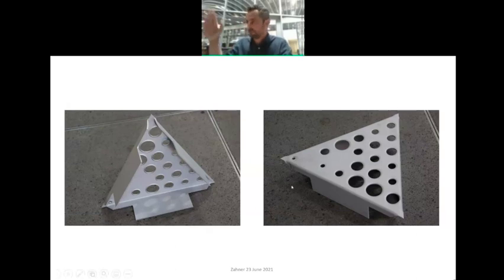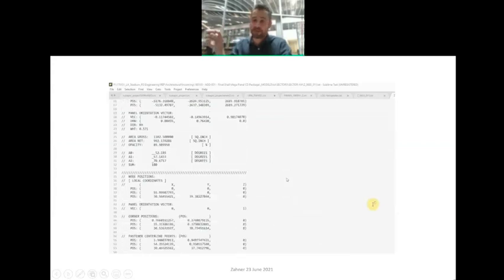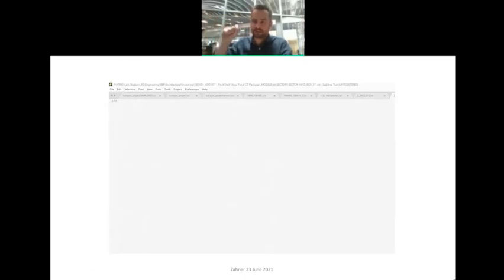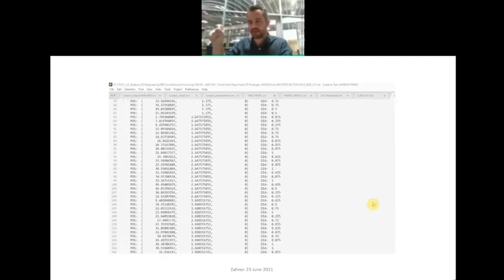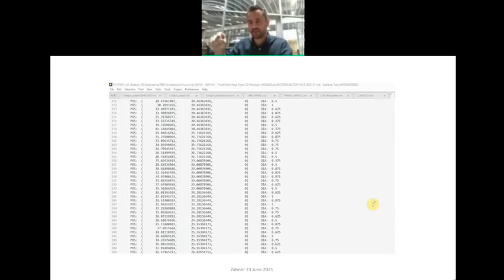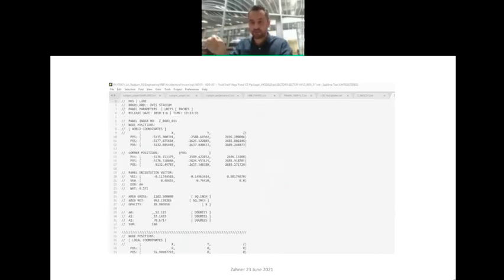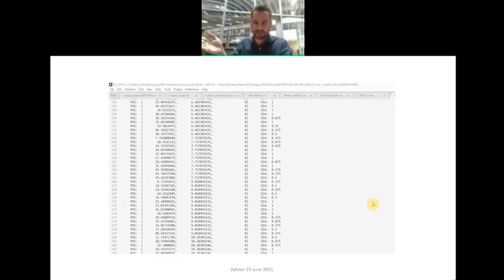This is a picture of some of the code that was given to us by HKS, which we worked directly with them to make sure that we could get to this level. They gave us specific XYZ coordinates of every perforation location on the entire building. Normally we would not get to this level, but we were able to work with them early to optimize this, and it was far more efficient for everybody involved to have them provide us with this data.